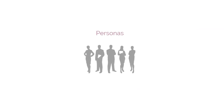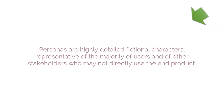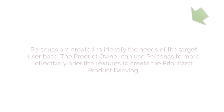Personas. Personas are highly detailed fictional characters, representative of the majority of users and of other stakeholders who may not directly use the end product. Personas are created to identify the needs of the target user base. The product owner can use personas to more effectively prioritize features to create the Prioritized Product Backlog.